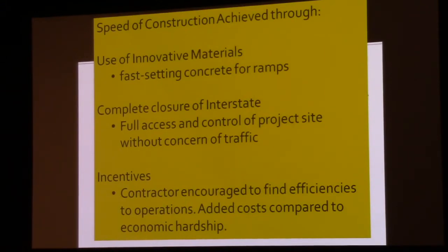Also, not necessarily by design, but because of the situation they were in, complete closure of the interstate. Here's one where the road was completely closed, no traffic on it, so the contractor had all the flexibility in the world in regards to how they were going to build this. You don't have to worry about managing traffic. You have full access to the project for coordinating multiple different operations going on at the same time.